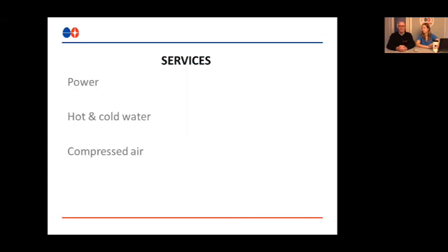And we provide information about services we require early on in the installation process or discussion process in terms of our machine specifications. But those are the critical things that our machines need to operate. And if they can be timed out by the customer or the contractor to be complete before we're done, it's even better. That way our machines can have the functional test while our supervisor is on site and wrapping up his details.